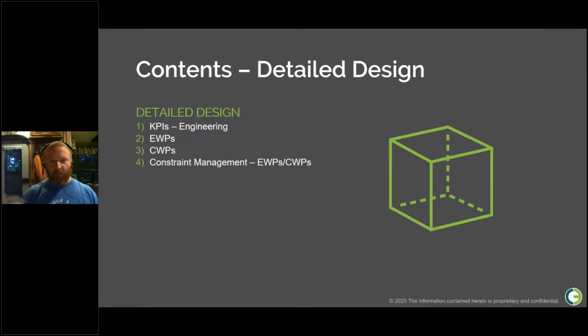We spend a lot of time in AWP talking about IWP constraints, all the stuff that you need to have before you can release an IWP to the field, and that's very, very important. We don't always put the same amount of focus on the EWPs and the CWPs. In the end, this is a bundle of work that needs to get transitioned from one party to another. So we need to know, here's all the list of things that you need to do or that needs to be included in this before you should be handing it over to the next person in the stream.